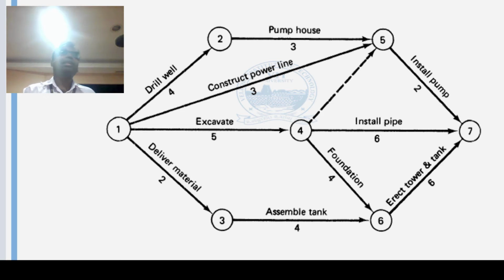Many times you will see, on your scheduling software, the timeline can be given in quarters, that is every 3 months, or in half years, so on and so forth. You can divide the entire process. Your L1 schedule can even be in years. For example, if the Hoover Dam was to be programmed, you will be putting it in the order of a few years. Excavation, river training works, 2 years.